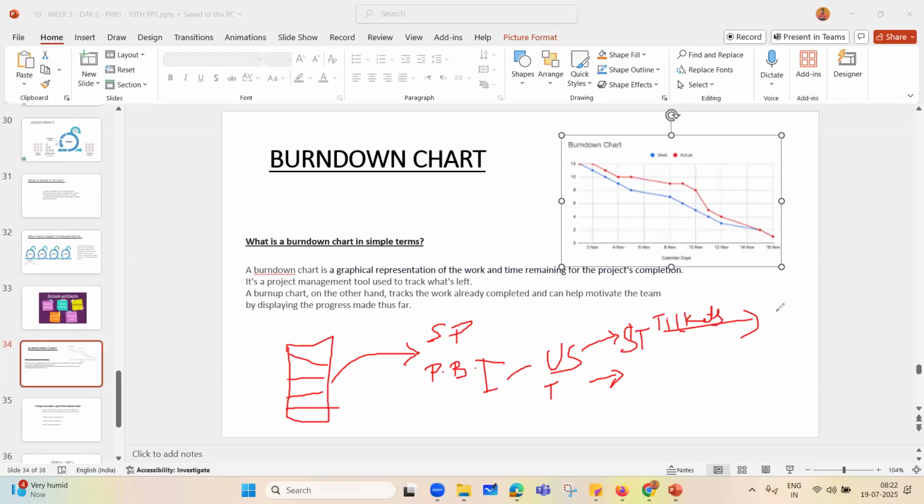Every ticket will have two key ingredients as input. One is called duration, and the other indicator is called time log. Say, for example, one subtask under a user story is assigned to a coder, and it says the total duration, the commitment he is making, is 3 days, which means 24 hours.